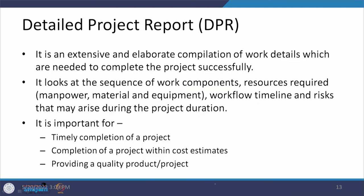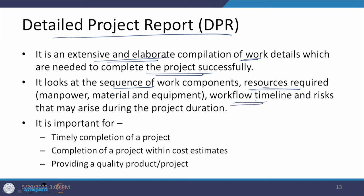Once all of these things are done, the last step is to prepare a report to be utilized for construction. This is an extensive and elaborative document providing information on each and every aspect of the work — how it will be taken up in a sequential, timely, and smooth manner. It covers what sequence is followed, what resources are required at what time, when each task is to be completed, and what risks exist and how they can be remedied. This document is the Detailed Project Report.